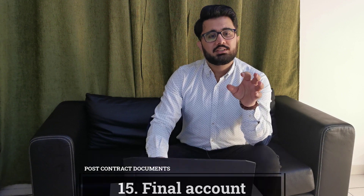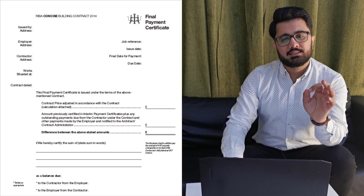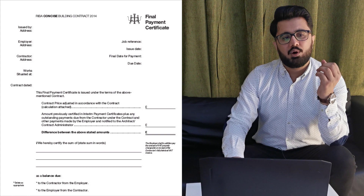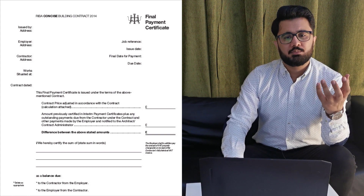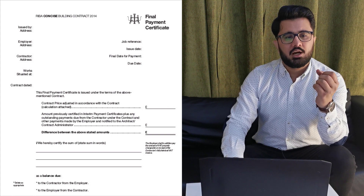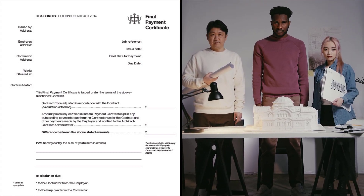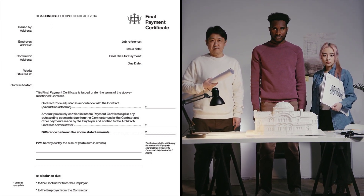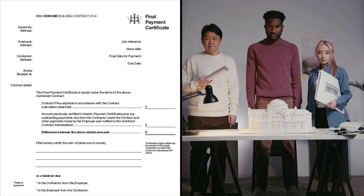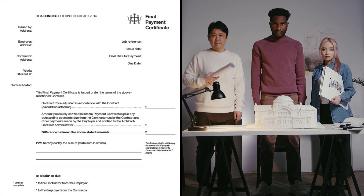Preparing the final account — the final account is the closing payment for the contract. The QS generally prepares this using the original contract sum as the starting point. The employer is also responsible for the final account, and the best approach is for the client's QS and the contractor's QS to work together to produce an agreed account, which will generally serve as the starting point for final account discussions.